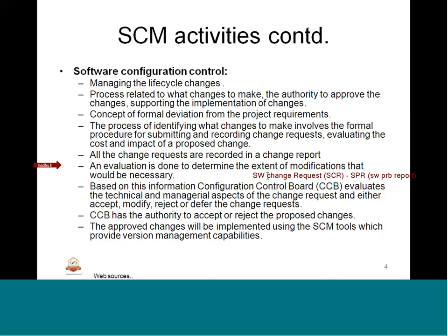And in some projects these changes are communicated using defect tracking tools such as Bugzilla. For a particular change, a bug is opened and all communications are done through that bug, and relevant stakeholders should be communicated accordingly. So that itself will become an SCR, or software change request, maintained within the tool, and automatically it is recorded who is owning that change, who is responsible, and who is doing the evaluation. All this will be taken care of.